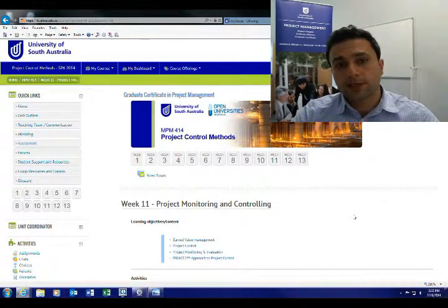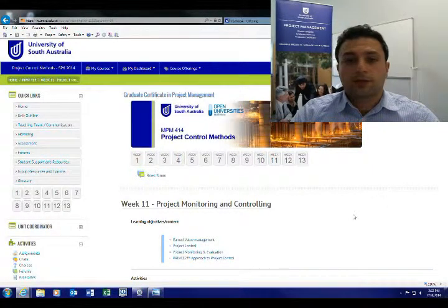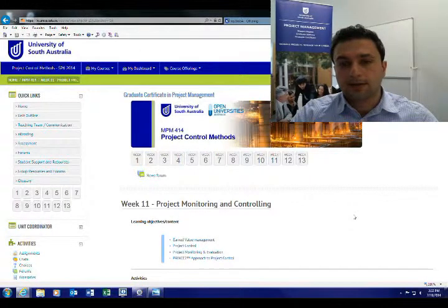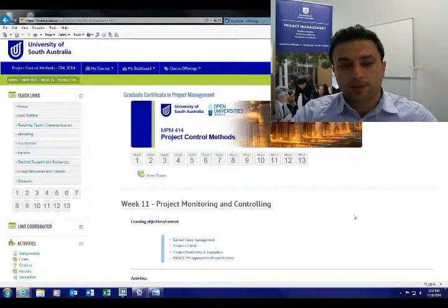And the schedule performance index, in a simple form, says we are progressing at so and so percentage of the rate originally planned. So an SPI of 0.9, which is less than 1, shows a lesser rate of progress compared to the planned rate of progress. While reviewing the cost performance index and schedule performance index, anything less than 1 is not good, because CPI less than 1 means over budget, and SPI less than 1 means delaying your project completion.